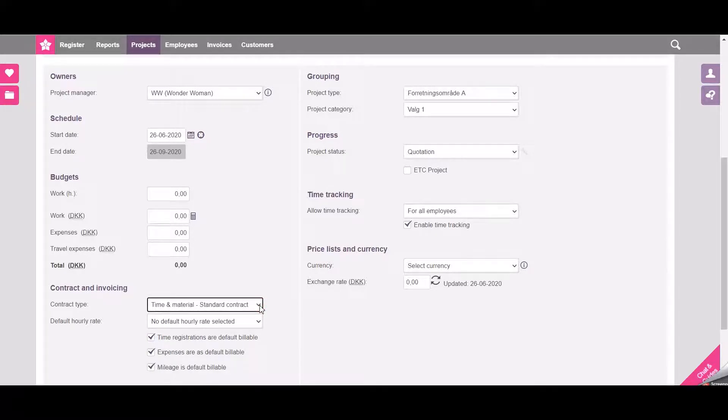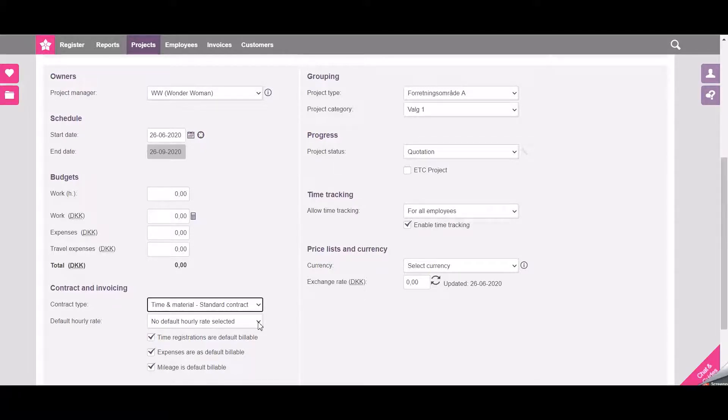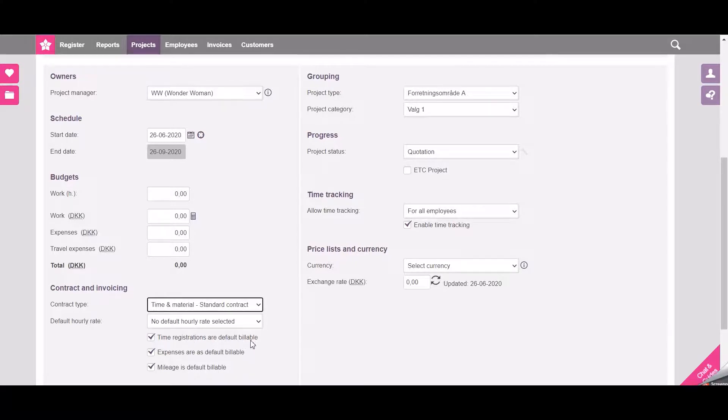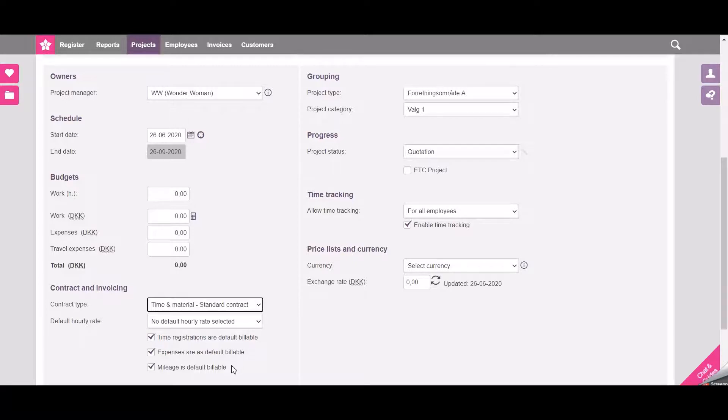I choose not to select any default hourly rates. I can see here that time registrations will be billable, also the expenses and the mileage registrations on this project.